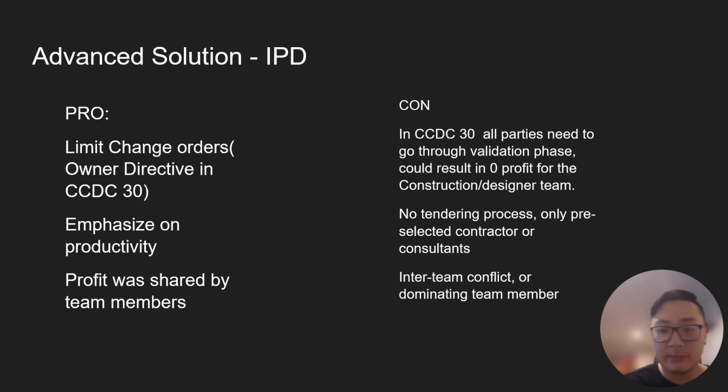And also there could be inter-team conflict, or you have one party that's really strong. In IPD, the payment certifier is the project team itself. So the PM team and the designer team have to certify the payment themselves. And the problem with that is you might run into situations where the teams will fight with each other. Okay, I think I need to get paid for this, and you have to do more work on this. It could lead to a lot of conflict that you don't have to have, and that would be one of the really big disadvantages I can see with IPD projects.